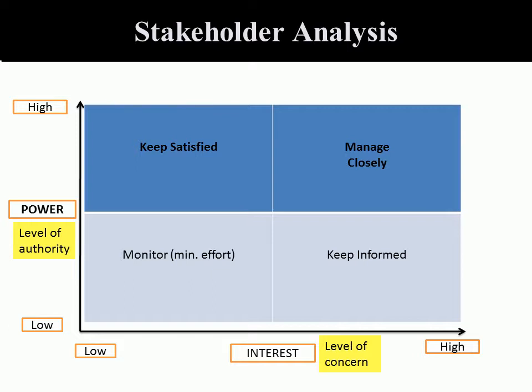It may not be in that person's political interest, but the person has authority because they are the chair of the regional corporation and they can pose some political influence that could cause some challenges negatively at that. So this is to aid in the development of a strategy when addressing various stakeholders. You will not address each stakeholder in the same way, for the sake of effectiveness. So you will address each stakeholder, or develop a strategy of what you will do and how you will engage them, depending on this power interest grid and which quadrant they may fall into.